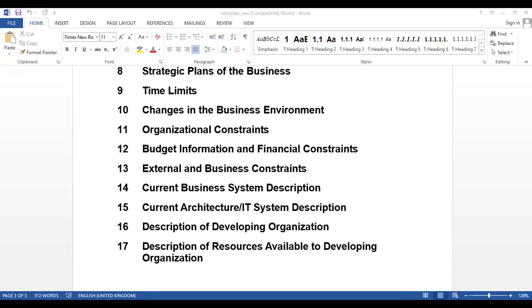Many clients have given you templates for everything. Yes. Sometimes the client will say, we don't want your template, we have our own detailing. They will share that request for work. But for the statement of work, normally we send this one. It is a response to the request for work. We send it to the client with the details, and they sign it and send it back to us. And we share a copy with the client. Clear with you?